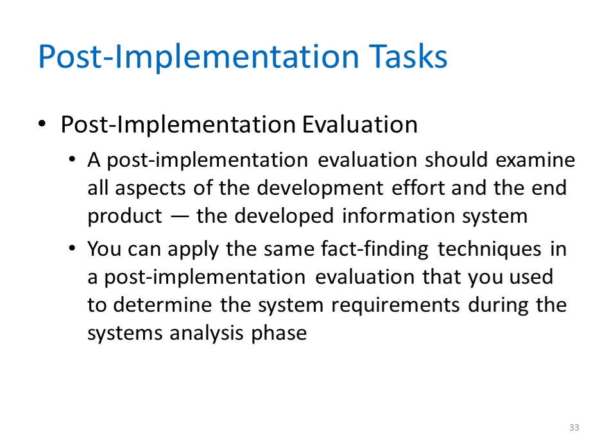A post-implementation evaluation assesses the overall quality of the information system. The evaluation verifies that the new system meets the specified requirements, complies with user objectives, and produces the anticipated benefits. In addition, by providing feedback to the development team, the evaluation helps improve IT department practices for future projects.